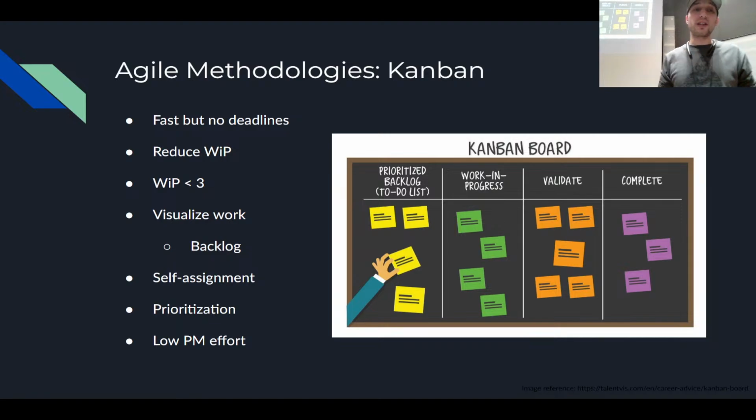Now, the most basic version of Kanban is using a Kanban board, which started with, here's a wall, here's a bunch of Post-its, right? And that's very simple. And it's incredibly effective. That alone, if you don't have any kind of task management process, can be a huge improvement. Especially because if you're doing this for the whole team, all you got to do if you want to see how someone's doing is just go look at the board. And you can be like, Alex, why do you have a WIP of 5, right?